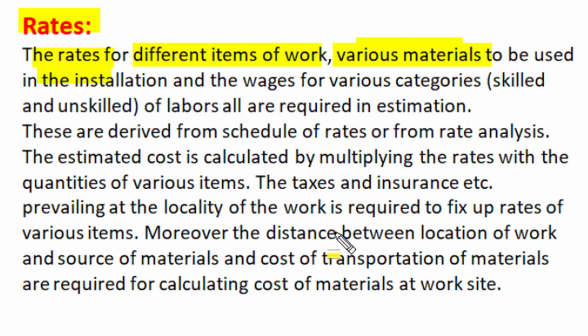We also need wages for various categories of labor that are required in electrical installation, and in electrical installation we need skilled supervisor, electrician, semi-skilled wiremen and unskilled helper to execute the complete installation work in a most optimum manner, and we need wages of all different categories of manpower used in electrical installation.